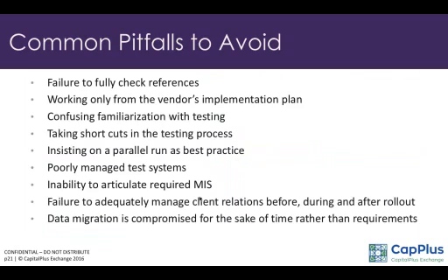The other thing is most people don't make a decision about the history data. How much of history do you need? Whether it's 24 months, whether it's 36 months, or just 6 months. These are some of the pitfalls that you must avoid.